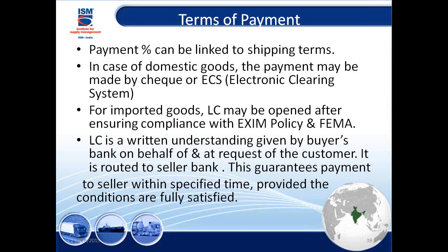I will take only one term. I know my colleague has touched on it. If you're saying CIF, legally, the moment the seller gives you shipping documents, irrespective of whether the goods have reached you or not, he can claim the payment. And if your payment terms are 30 days after receipt of shipping documents, you can't stop the payment legally. So keep in mind that whether you receive the goods or not is the second part. Even if the ship is sunk is the second part. So my request to you is that we have to follow this.